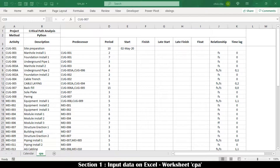Two worksheets are required for critical path analysis: one named CPA and another named Calendar. Worksheet CPA is organized to define schedule input and to return the output of the program run.